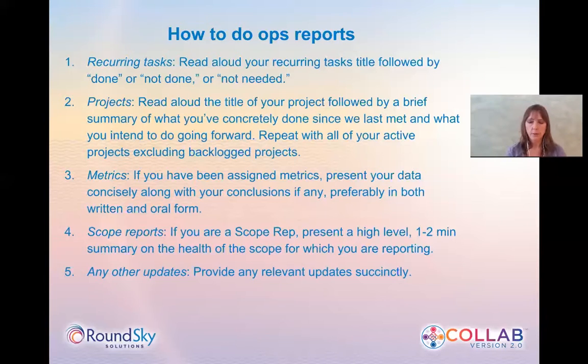Yeah, absolutely. Such a great question, Jamie. And honestly, to be concise, which is very important during ops tracking, because it could take up your entire meeting time if we go into too much detail, the key is to report at the project level, and projects have many, many next actions. And so we don't actually want to hear about that email you sent to John or the phone call you placed to Jane around your project of getting, let's just say, the website updated. What we want to hear is: website updated. Since we last met, I got all the new templates into the website and I worked out some technical details with our vendors.